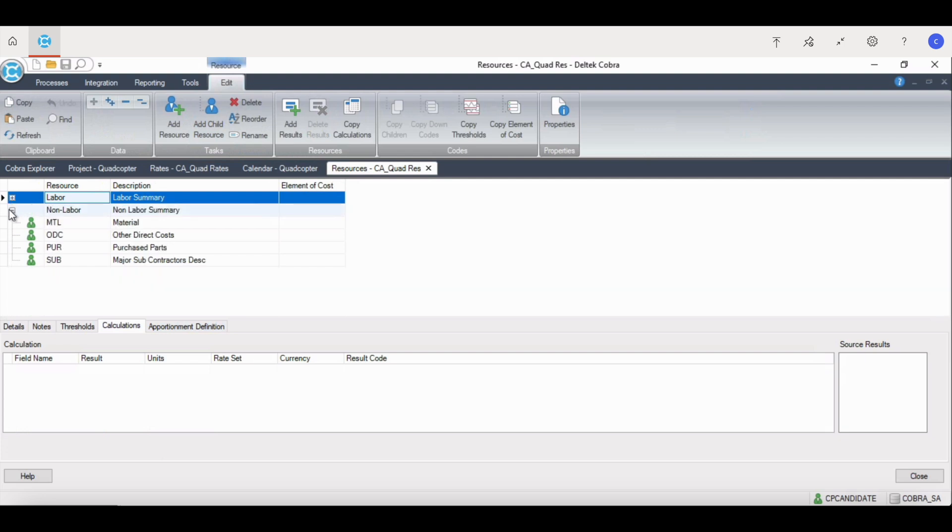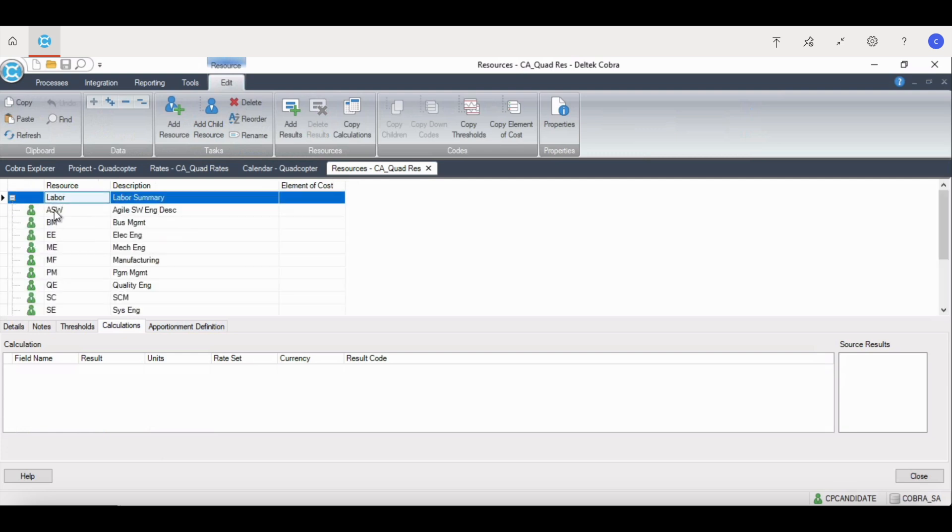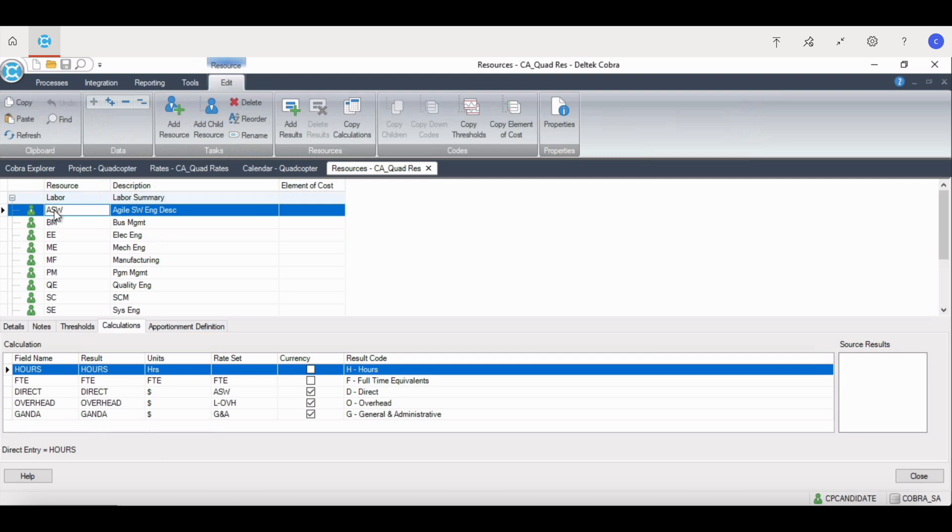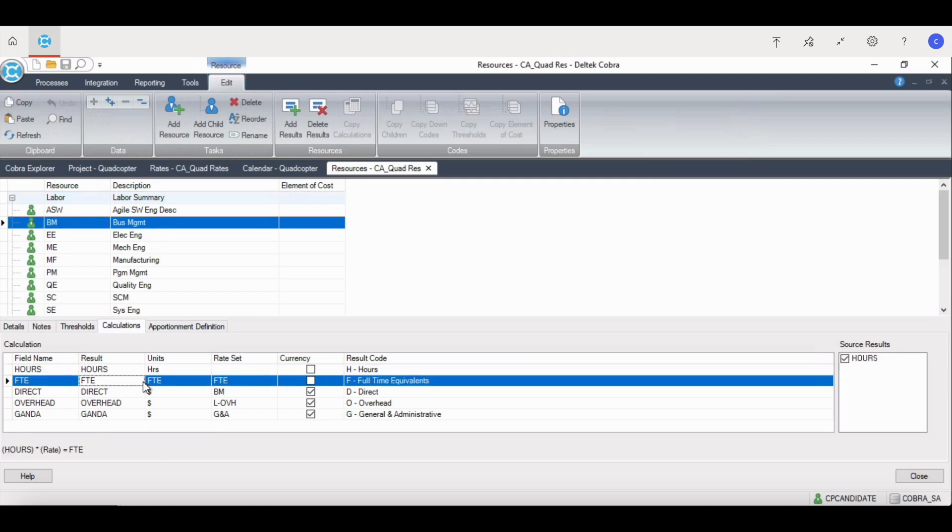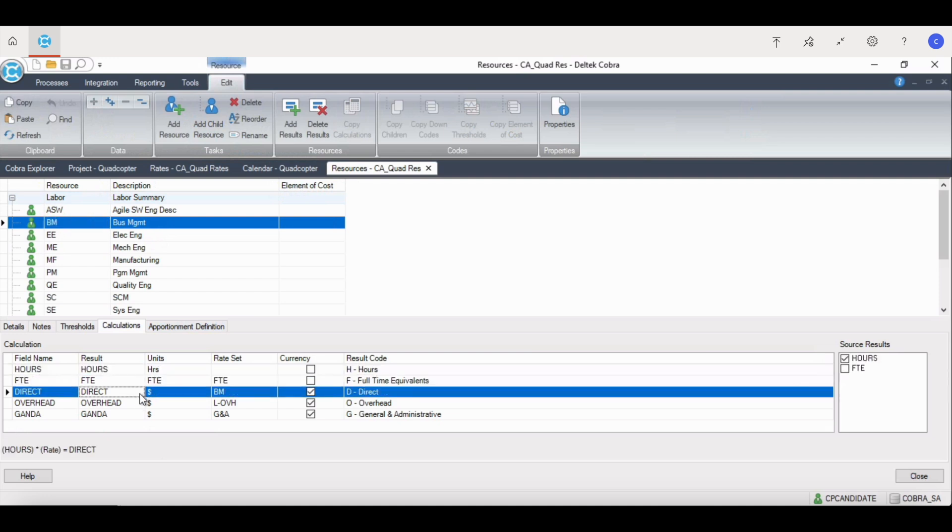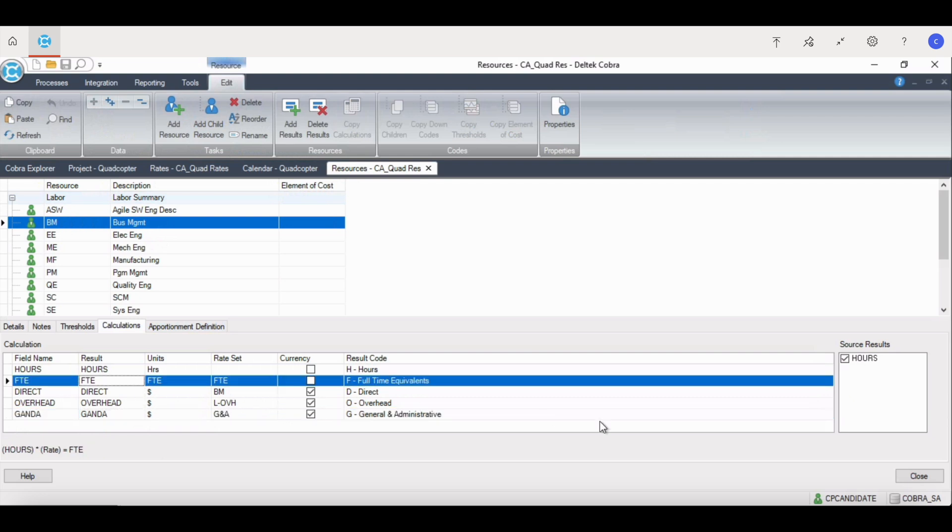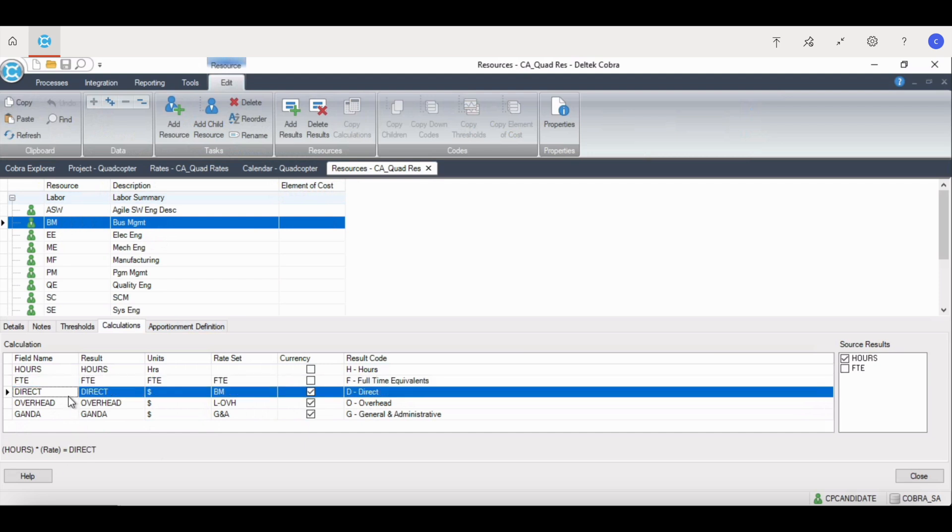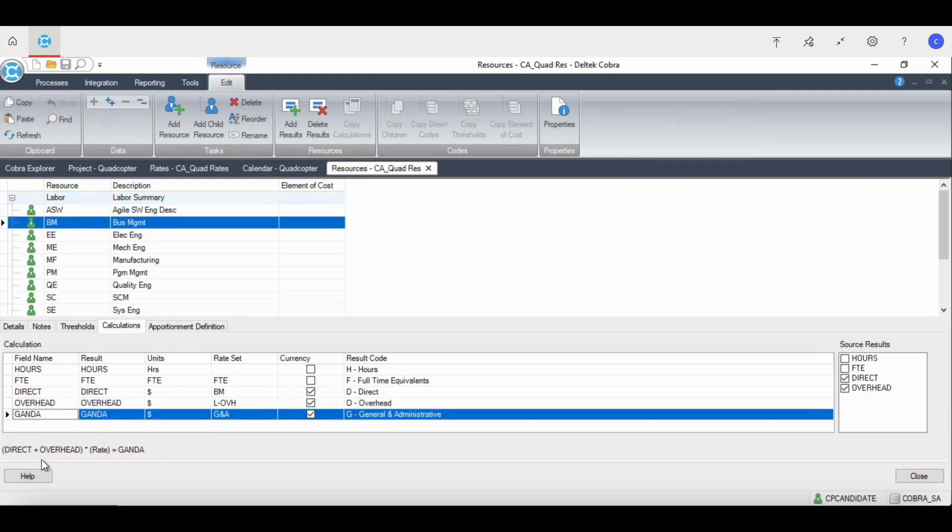Here, we break down labor and non-labor. And if I click on the Agile Software Engineering, and if I click on Business Management, you can see my calculations down below. We go from hours to FTE, direct, overhead, and G&A. Each result builds upon the one above it. For example, FTE takes the hours as its source results, and it multiplies hours times the FTE rate set. Direct takes the hours and multiplies it by the Business Management rate set. And then overhead is the overhead rate times direct, while G&A is direct plus overhead. As you can see here, we've selected both of those times the G&A rate.